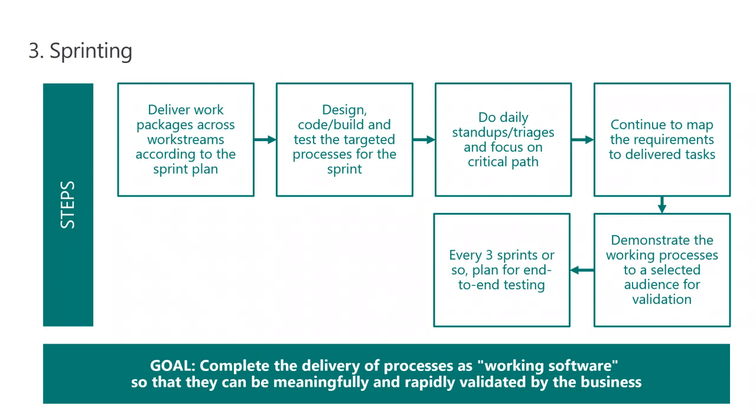Do your daily triages and stand-ups and focus on the critical path. Your daily stand-up is now a business process focused stand-up. It's not a task level stand-up. So you're saying, where am I at on this business process delivery? What part of the process am I working on? What have I done? What are my obstacles, etc.